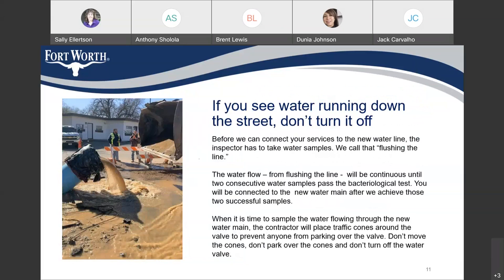If you see water running down the street, don't turn it off. Before we can connect your services to the new water line, the inspector has to take water samples — we call that flushing the line. The water flow from flushing the line will be continuous until two consecutive water samples pass the bacteriological test. You will be connected to the new water main after we achieve those two successful samples. When it is time to sample the water, the contractor will replace traffic cones around the valve to prevent anyone from parking over the valve. Don't move the cones, don't park over the cones, and don't turn off the water valve.